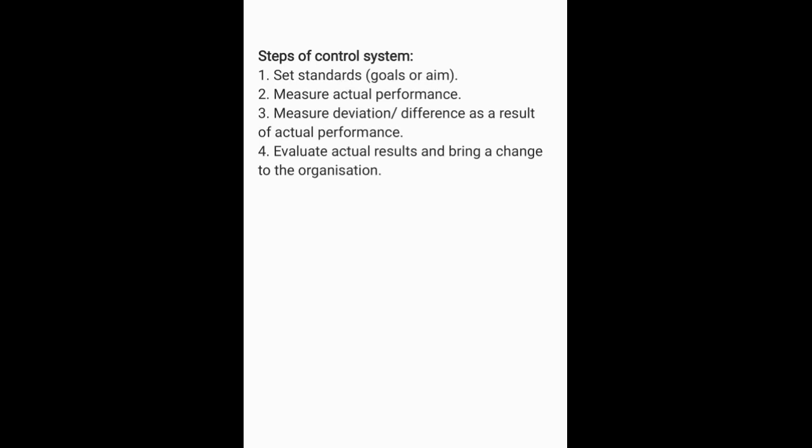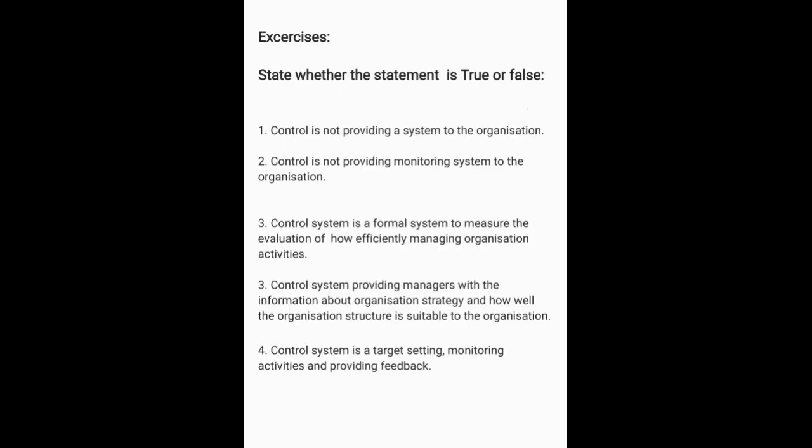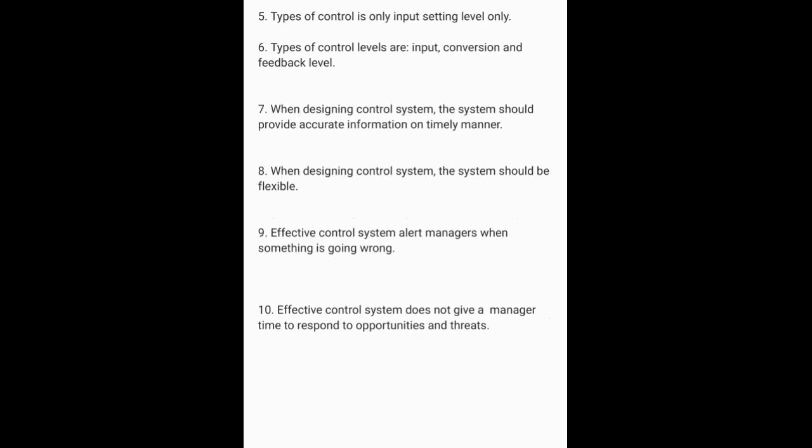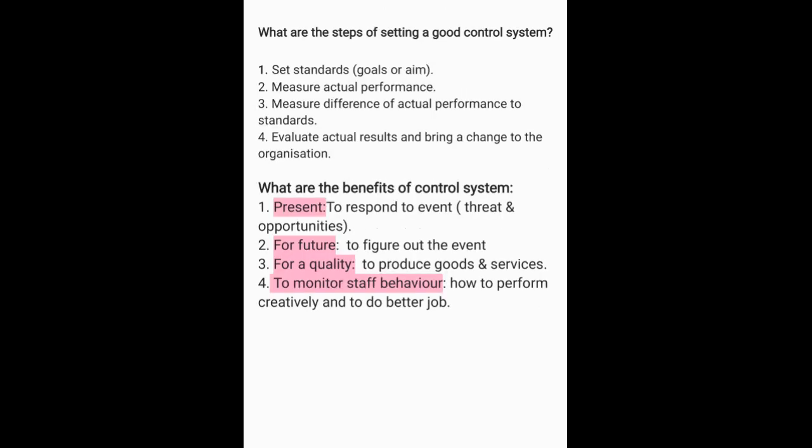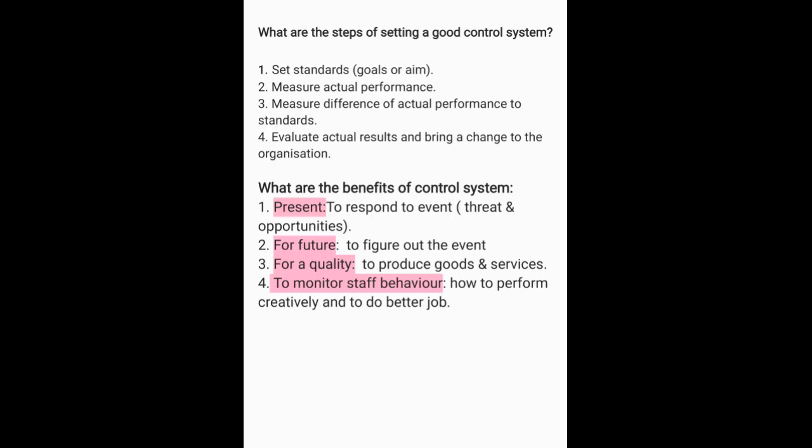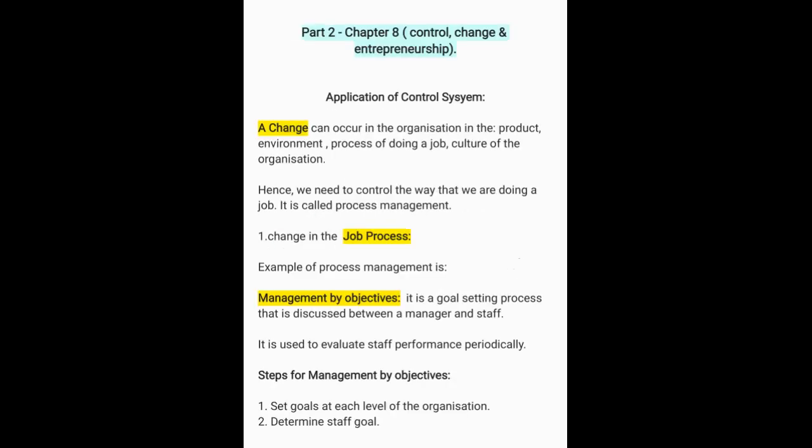Then steps of control: set the goals, then measure the actual performance, then the deviation, measure the difference, then evaluate it and bring the results. Very easy, right? Then you solve the exercise. I suggest that you solve the exercise.